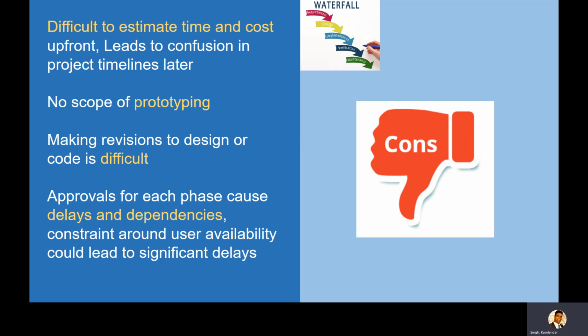There is no concept of prototyping. Once you have taken up the development, you are not doing a POC, proof of concept, or prototype, and going back to the customer and showing the prototype. You are going ahead with the complete phase, and then presenting. The customer gets to see the product only when it's done, when all the phases are done, when the 3 years have passed, or probably in the user acceptance testing.